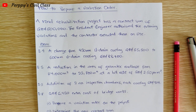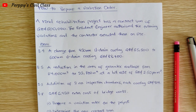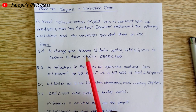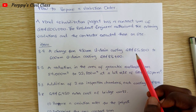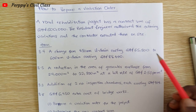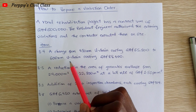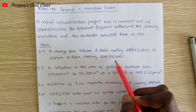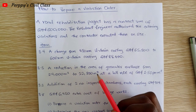Today's question is similar to that. A road rehabilitation project has a contract sum of 500,000 Ghana cedis. The resident engineer authorized the following variations and the contractor executed them on site. Item 3.4: a change from a 450mm U-drain costing 65,500 Ghana cedis to a bigger 600mm U-drain costing 88,400 Ghana cedis.